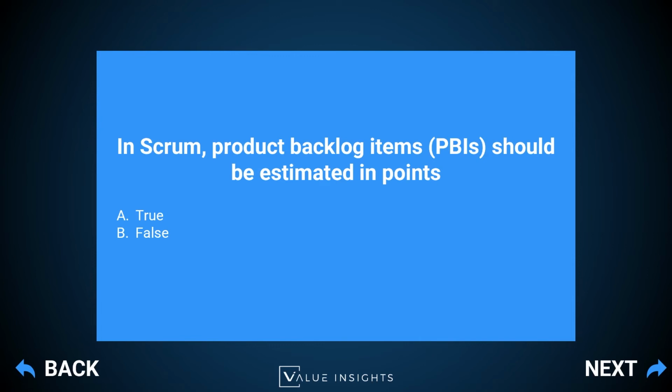But what the Scrum Guide actually tells you is that there is not even an estimate. We talk about sizings. And the sizings can actually be done in several ways. Sizing could be estimates which are done in hours, estimates which are done in points, estimates which are done in t-shirt sizes. But the sizing could also be done by breaking down those items into pieces which can fit within a sprint. So you also have this common current in the Agile community called no estimate. People are not doing estimates, but the developers are reviewing those items and believe that they can fit them in a sprint. And this is basically a sizing as well.